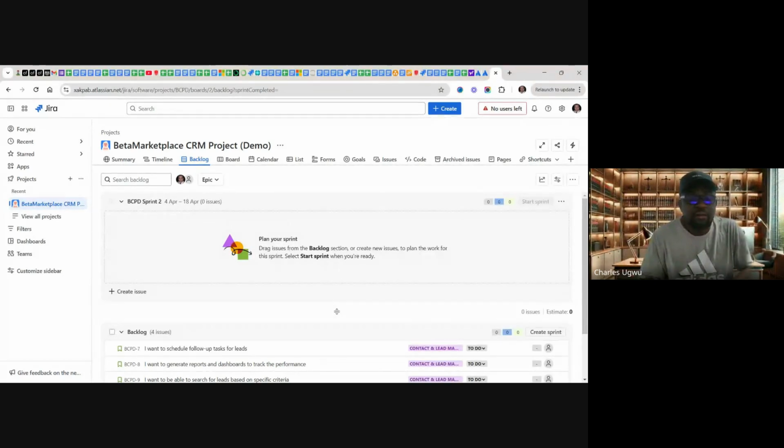Retrospective is the time the team will come and inspect and adapt. Kind of house cleaning before the next sprint. Everybody has a meeting. You guys will talk about what didn't go well. Kind of lessons learned meeting in agile environment. We call it retrospective in agile. But if you go to waterfall or Prince 2, they call it lessons learned meeting.